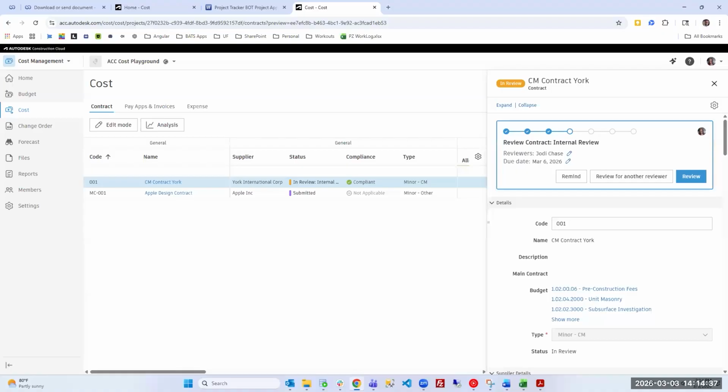The issuance of the purchase order should be the vendor's notification to proceed. The ACC contract will receive the final execution after the purchase order has been issued, so you can consider the UF purchase order notification that you receive from MyUF Market as your notice to proceed.